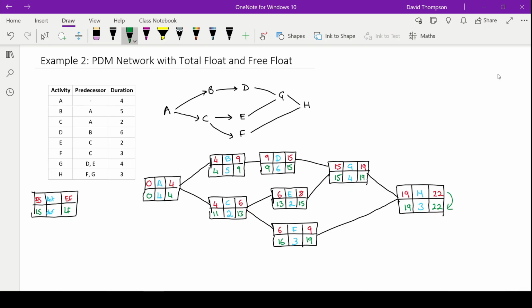So you can see here now, this is how we fill in the network diagram. We've got all our early starts, early finishes, late starts and late finishes all drawn up. So what we could do next to identify the critical path, we showed you a quick way to identify the critical path. There is a way we can do it using a thing called floats or stacks. I think they could be terms that you use interchangeably. So total float or total stack. But I'll explain what that is now. So this is what we'll use to work out the critical path of the project.